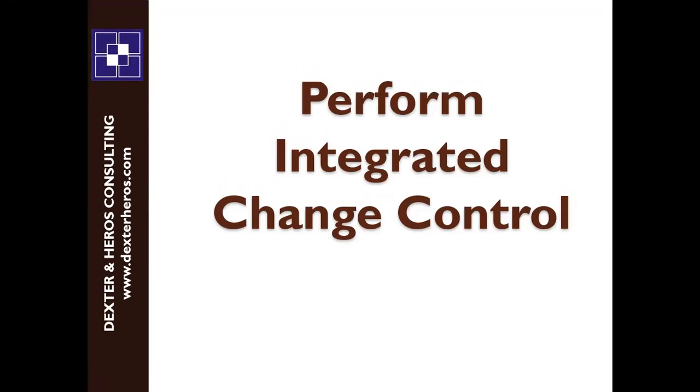All right, so I said step one, you need to observe the change. Step two, you must officially write for the change to be made. Step three, it involves meeting with the stakeholder or the sponsor. Then I said, in some big organizations, there is always a steering committee to attend to you as the project manager. A big project like connecting a railway track from Nigeria to Ghana is a federal government job. Mr. President is the sponsor of that project.